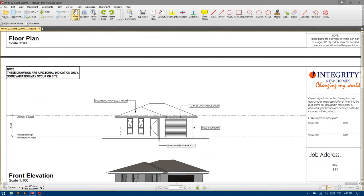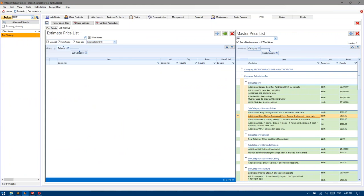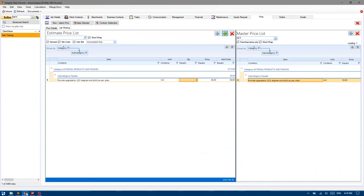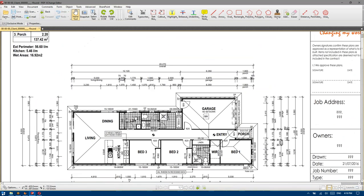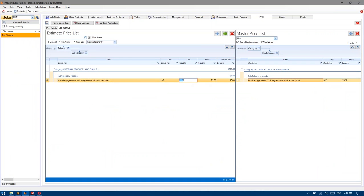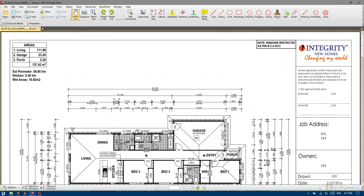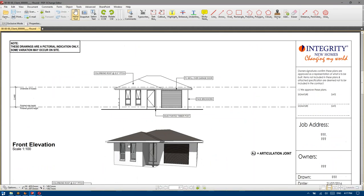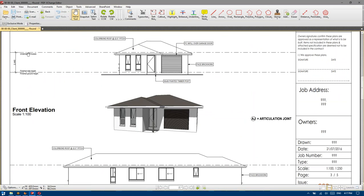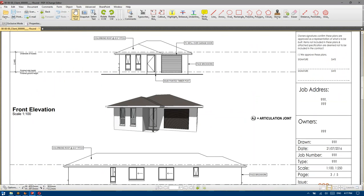22.5 degree roof pitch — that's applied to the entire covered roof area which would be this value here as well, 137.42.